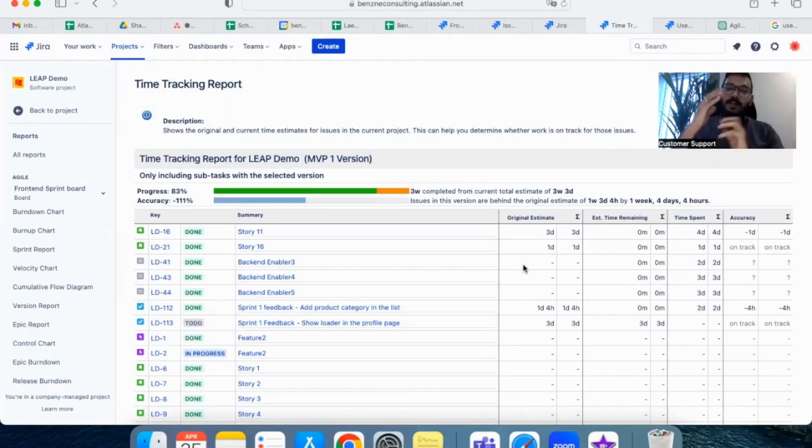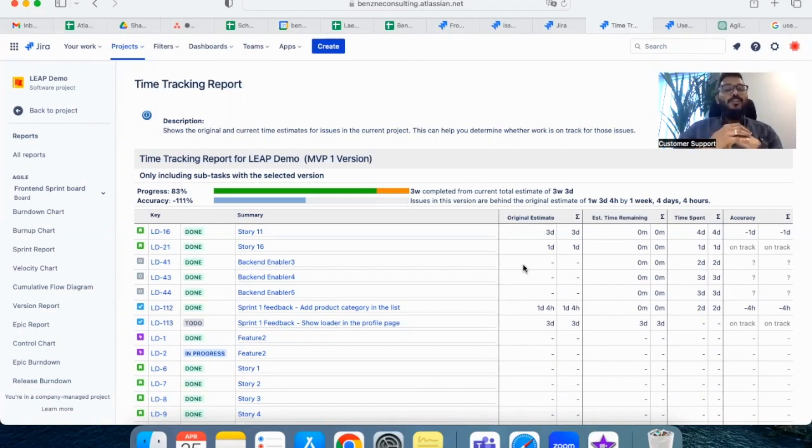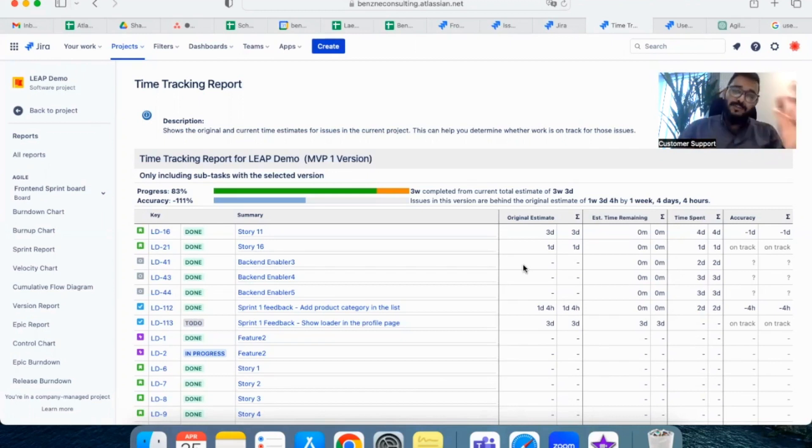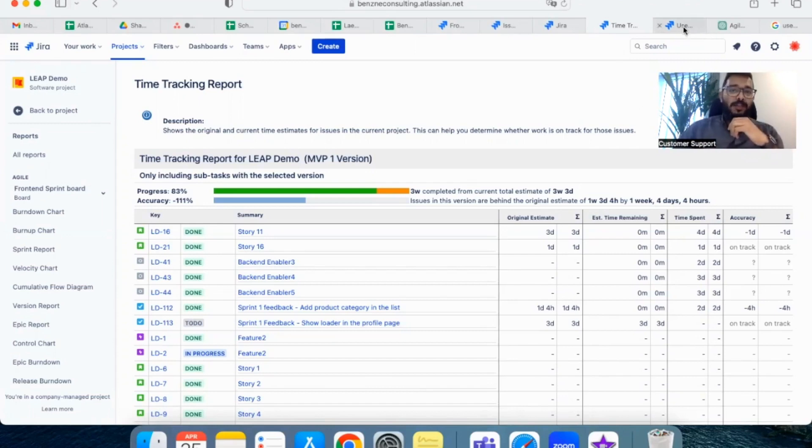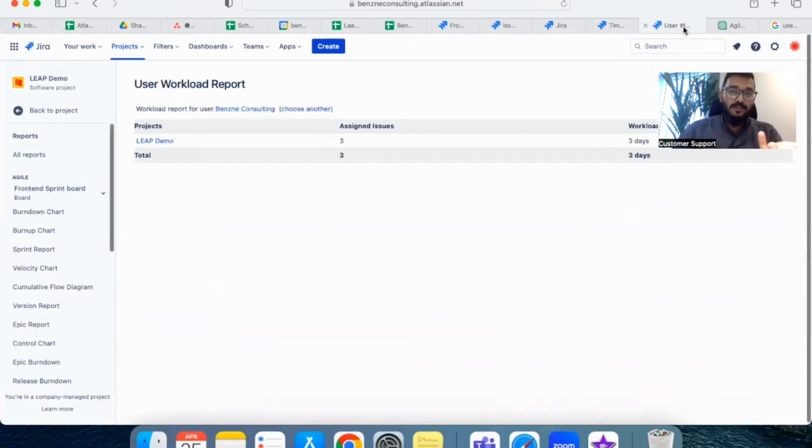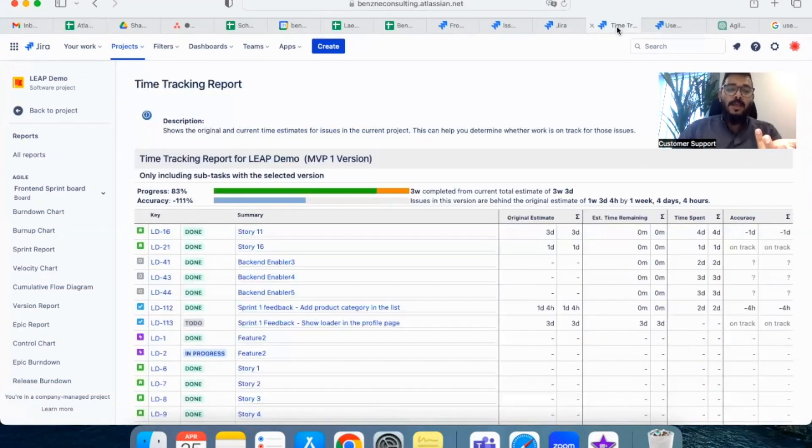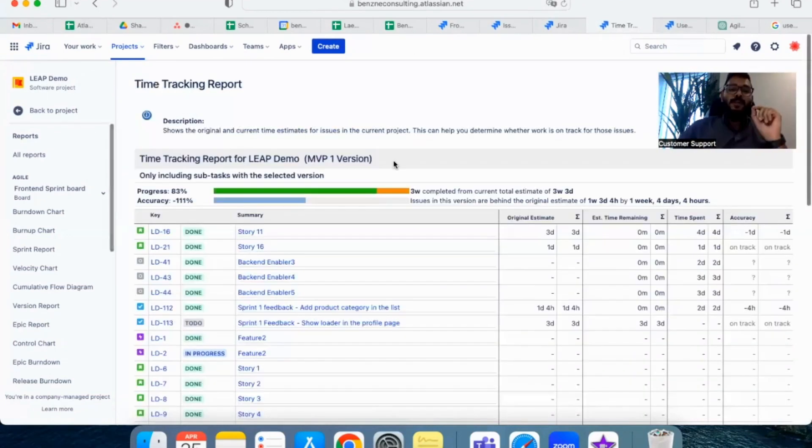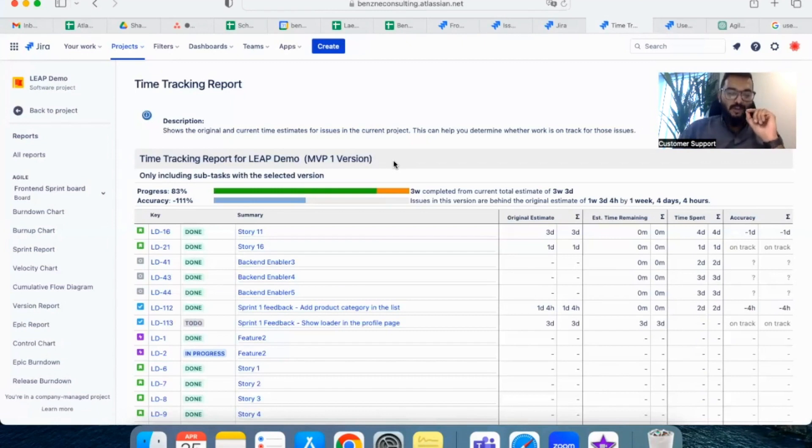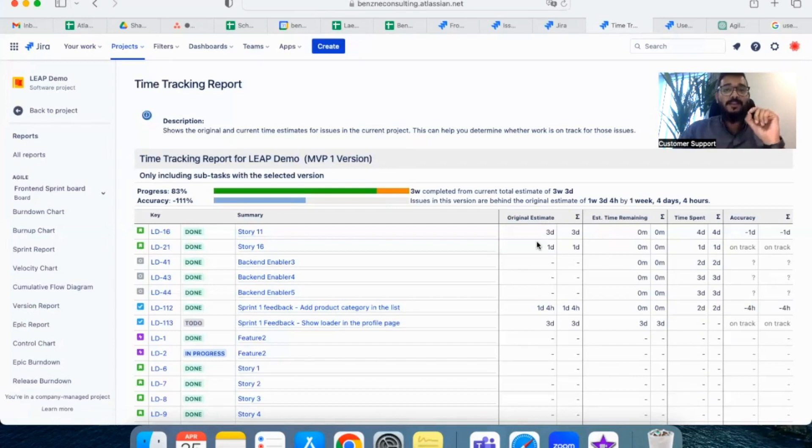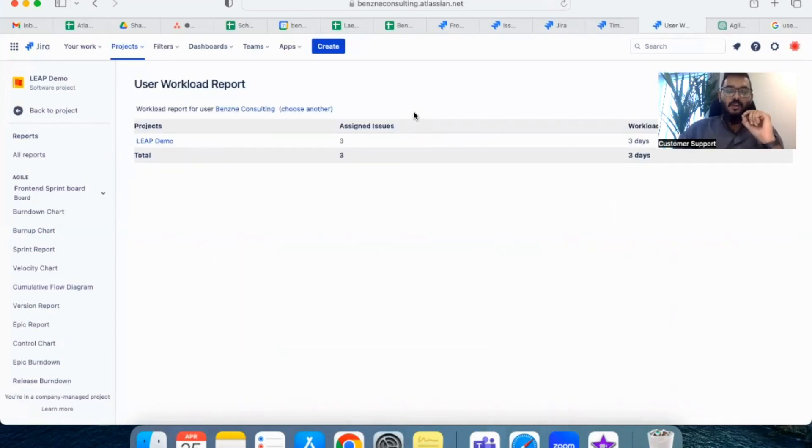There are two predefined reports which JIRA provides. One is the time tracking report which you can see on the screen. The other one is the user workload report. But however, time tracking report does not tell you which person has worked on which ticket and how long has he or she worked on it.